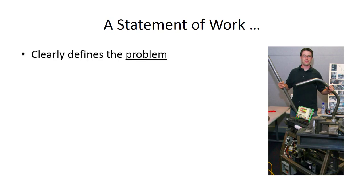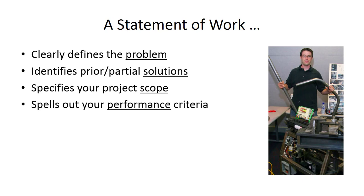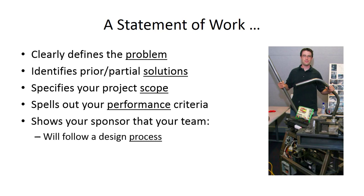For a senior project, your statement of work clearly defines what the problem is that you're going to solve. It also identifies prior or partial solutions that have been attempted before, specifies what scope you will tackle, what exactly you are going to deliver, how much flexibility your final design has, and spells out exact performance criteria your final design will be tested against. It also shows your sponsor that your team has a design process and the resources required to solve the problem.